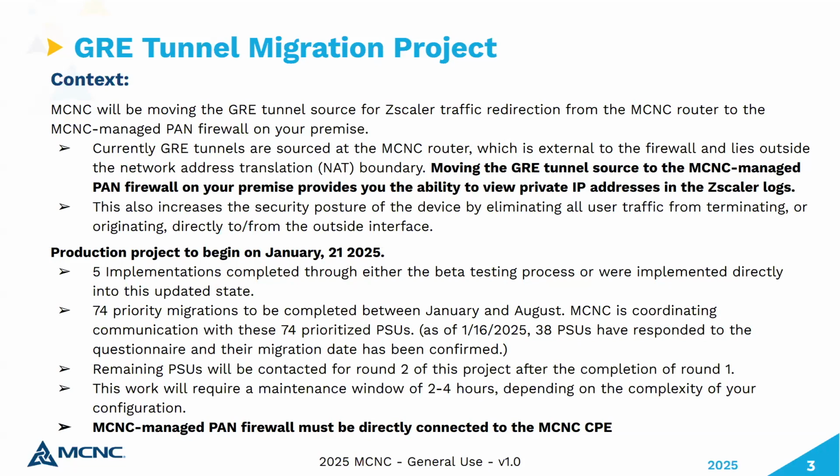And the other very important point here is that in order for this to work, the MCNC managed PAN firewall needs to be directly connected to the MCNC CPE. So several PSUs, school districts, and charter schools have switches for various reasons between our CPE and our firewall. Those switches will have to be removed. We have a pretty good inventory of who the PSUs are that have that configuration, based on information gleaned from our firewall deployments.